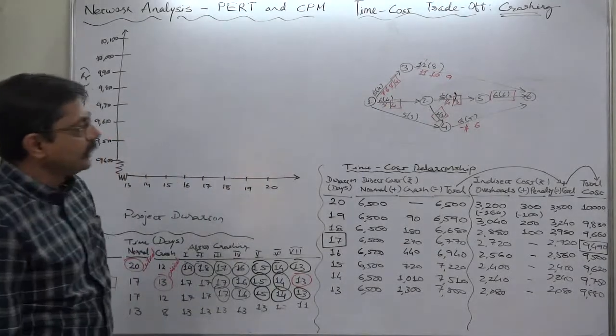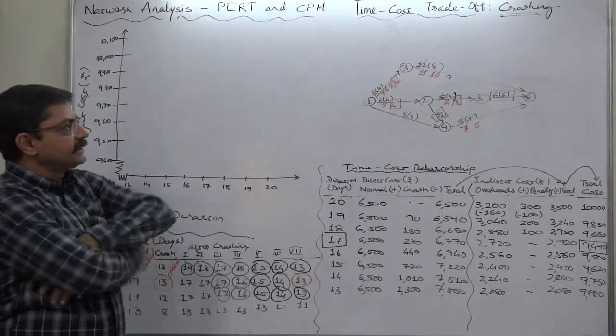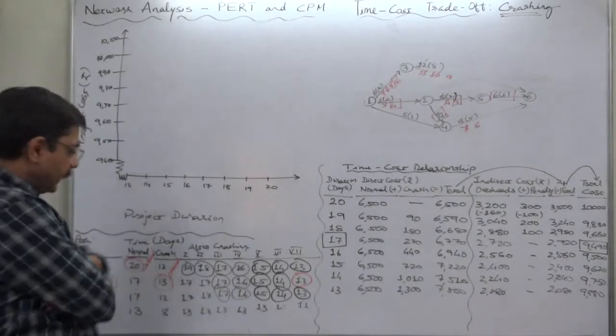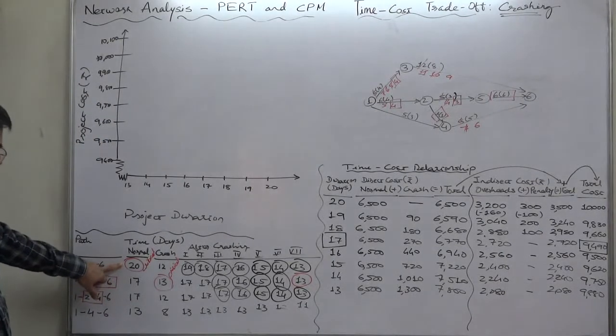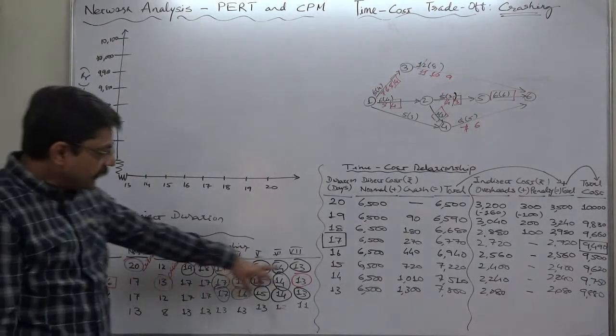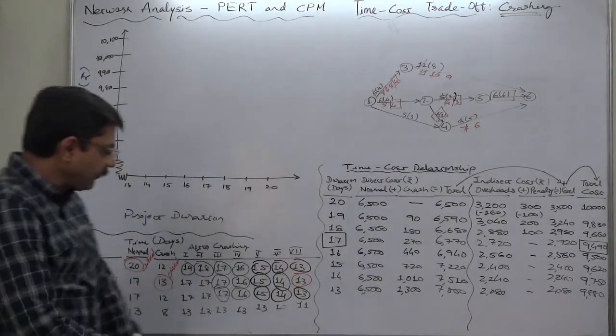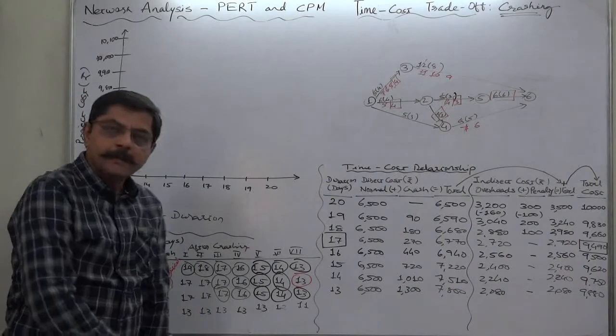In the previous two lectures we tried to understand the process of crashing and ultimately from the critical path of having duration of 20 days we have reached three critical paths of having duration of 13 days. Many of you may have a question that why should we not try to crash further this project.